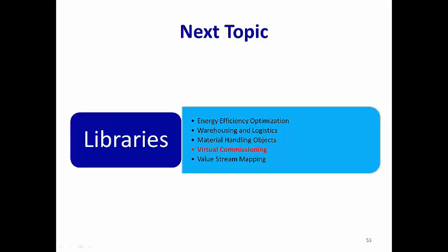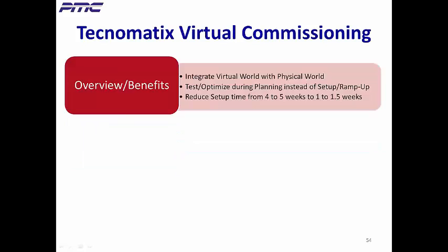Our next topic is virtual commissioning. Setup and ramp up of the systems implementation for robotics and automation is called commissioning. Traditionally, this step is done after the physical system is built on the shop floor. Technomatic's virtual commissioning lets you test and optimize commissioning during the planning and design phase instead of during setup and